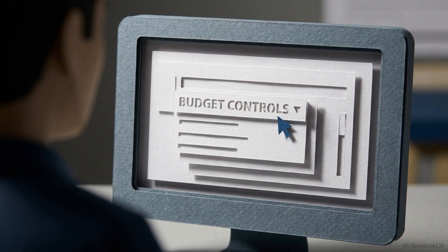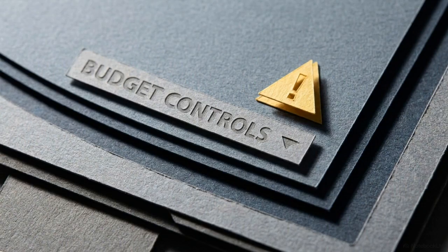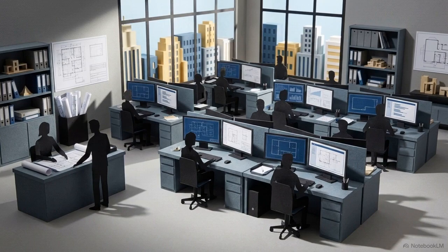Administrators must follow a strict operational rule. You can loosen restrictions at any time, moving from a controlled budget to an uncontrolled one. But once costs are flowing, you cannot retroactively tighten the grip. Selecting the appropriate control tier dictates the project's financial security and operational flow.